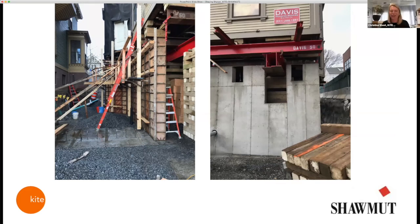Oh yeah, absolutely. And David O'Day's office, they do drone modeling. They basically have a point cloud, which in one image came from them, where they can reconstruct, complete with all the leaves and all the trees surrounding it. So they had a pretty good idea, and they shared that with us, and we reinterpreted it for architectural things. When we built that bridge, after the steel was set, Albert was talking to the carpenter. The bridge lined up within half an inch of where it was supposed to be. Trust but verify.